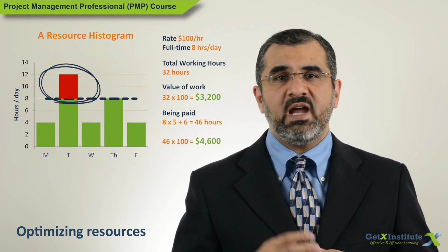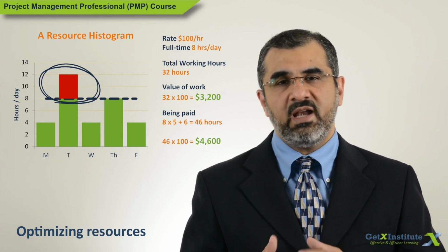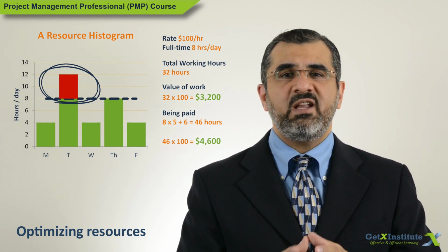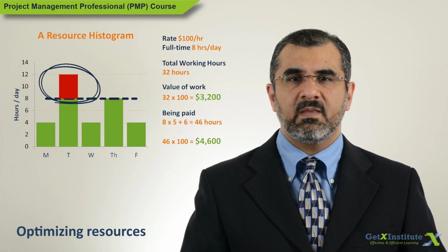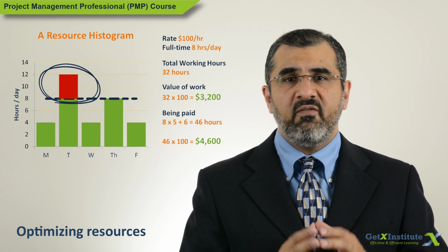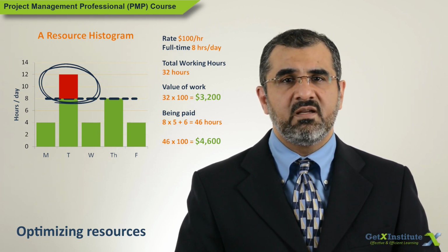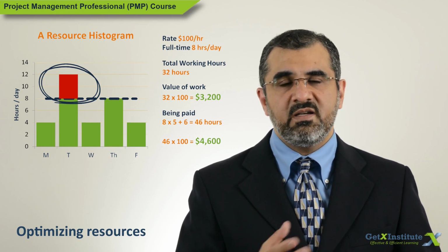One approach is to get rid of any over-allocation, even if it moves the deliverable or end date. No overtime can be paid. Every over-allocation must be removed. Or available resources are limited and do not have much flexibility. This approach is called resource leveling.